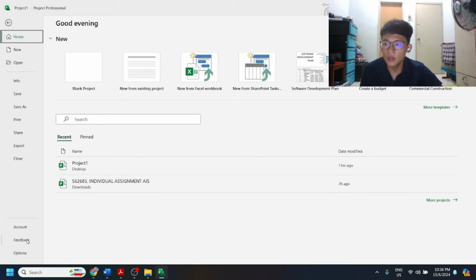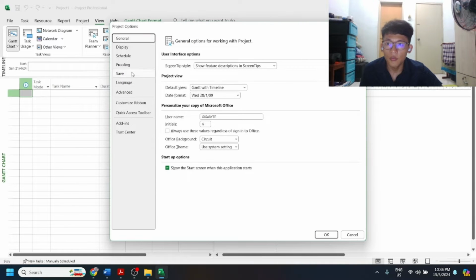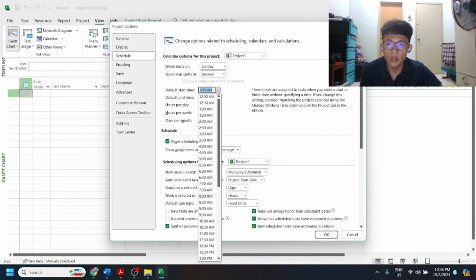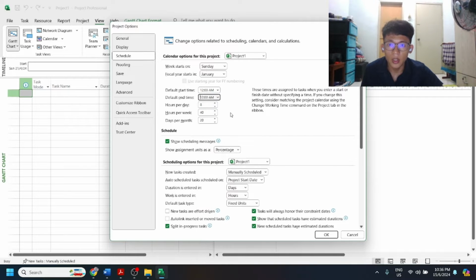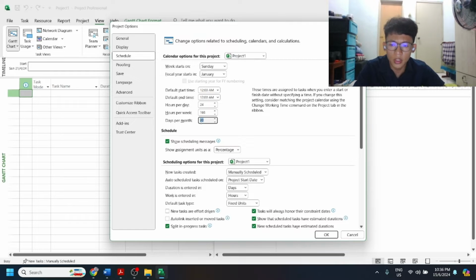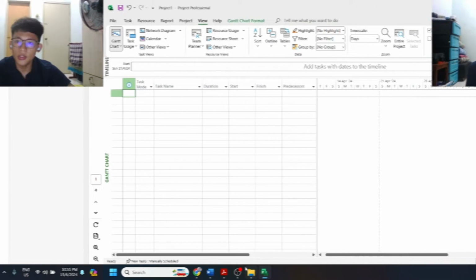Now we move on to Options, we go to Schedule, 12 AM, 12 AM ending, 24 hours, 168 hours per week, and it's gonna be 30 days per month, I think. Let's count. Yeah, I think so. And then it's going to its days, and that's it.